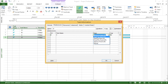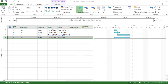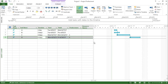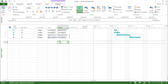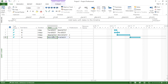Let's focus on the very first one: finish to start. I will click on finish to start and hit OK. The moment I hit OK, if you see on the right-hand side of my screen, the blue bars show that task D will only begin after the completion of task C — that's what finish to start means. When task C finishes, task D will start. Also, on the left-hand side, the start date for D has automatically changed — it has taken the finish date of C as the start date for D.